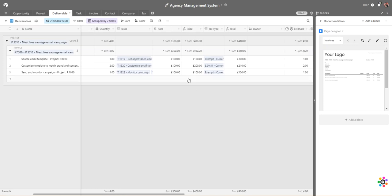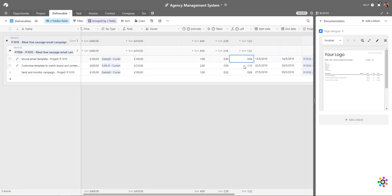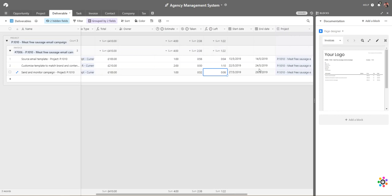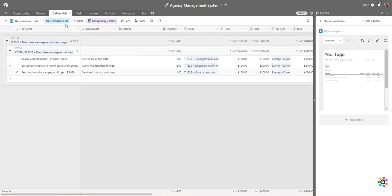On the deliverables you can also see an estimate — this is where we input our actual estimate of time: one hour, two hours, one hour. Clients don't need to see this, but it's very useful internally because we track against all related tasks and sum those up to see how long we've spent against each project. I can see I was four minutes under, one hour and ten minutes under on another, and eight minutes under on a third — overall a pretty profitable project. There's also related invoice and project reference data here.